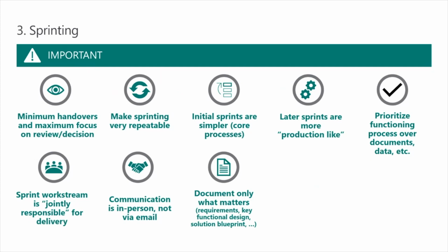Again, it's important that you minimize the amount of handovers. Every time you have a document handover, which requires somebody to go away, review, comment, approve, hand back to you, then somebody else hands it to another team, that is dead time, right? You need to minimize that, so the maximum focus is on a review in the room. If you need to get a design document reviewed, do it in a workshop environment in the room. Talk it through, right? Don't wait 5 days for it to go around a cycle. Make sure all of that can happen within the sprint. The idea behind sprinting is that you are literally sprinting. You're not stop-starting, you're not crawling and then restarting.